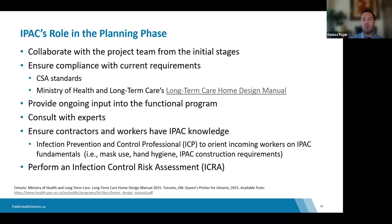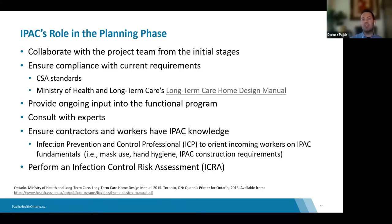For example, if rooms are being renovated and a resident becomes symptomatic and is put on additional precautions, you want that flagged for the contractor so they can modify their schedule — perhaps doing that room at the end once the individual is no longer on precautions. Your role includes orienting contractors to the risks and expectations, including hand hygiene and masking, ensuring everyone is oriented to what's required.